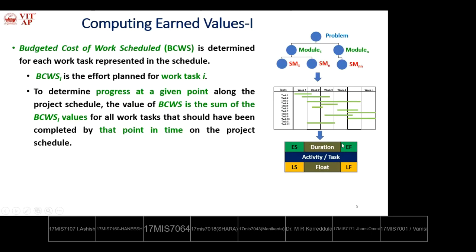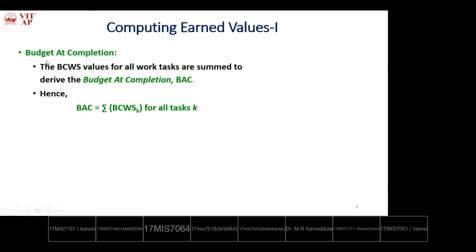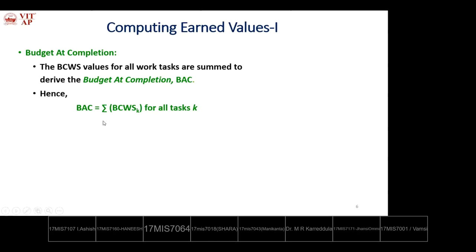Budget at Completion (BAC) is the sum of BCWS values for all work tasks, calculated prior to development: BAC = Σ BCWS(i) for i = 1 to N. BCWS is defined for lower-level elements; integrating all lower-level elements gives the parent-level information; adding all parent-level values gives grandparent-level information. BCWS goes top-to-bottom and BAC is calculated bottom-to-top.